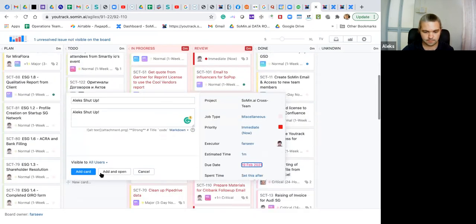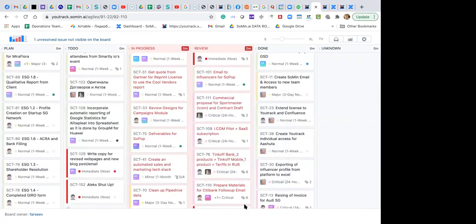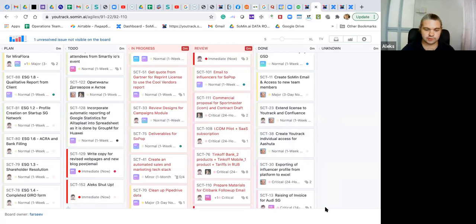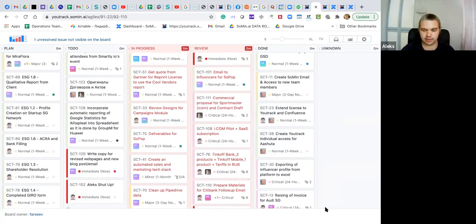Alex, I have a question. In the case of the estimated time for some tasks, I didn't know how long it takes for Mikhail or Malo to do. Should I just estimate, or how do I do with it? You estimate. You think this task will take this much time, and then the person who did it will put the actual time that he required to accomplish.